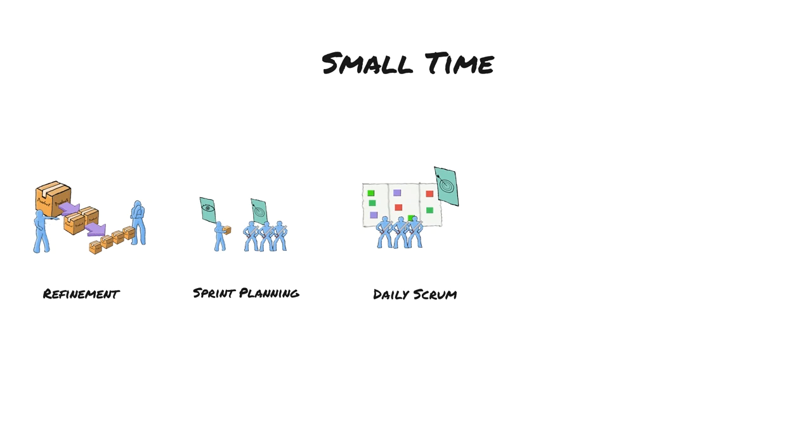The people in the team involved in the actual building of the increment, the developers, have a daily meeting, the Scrum, to discuss their progress toward the sprint goal. At the end of the sprint, the team and stakeholders examine completed increments and discuss how they affect the long-term product goal. These will be fed into the next planning session.